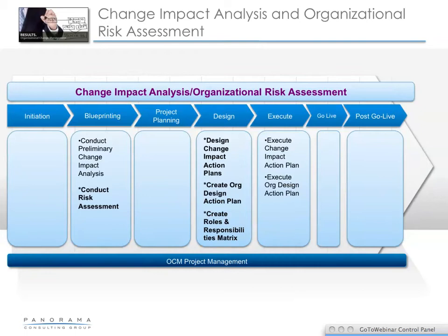Change impact analysis really gets kicked off during blueprinting. Blueprinting is, in fact, where you are identifying and documenting your to-be process flow. So that is where we begin to conduct that change impact analysis. And then we also, at this point, conduct a risk assessment. Then it's actually during design that we will design those action plans and create any organizational design around the action plans, and then we also put together our roles and responsibilities matrix.